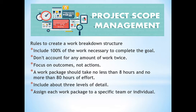There are rules to create a WBS. First, include 100 percent of the work necessary to complete the goal. Second, don't account for any amount of work twice — focus on outcomes, not actions. Third, a work package should take no less than eight hours and no more than 80 hours of effort. Fourth, include about three levels of detail. Finally, assign each work package to a specific team or individual.